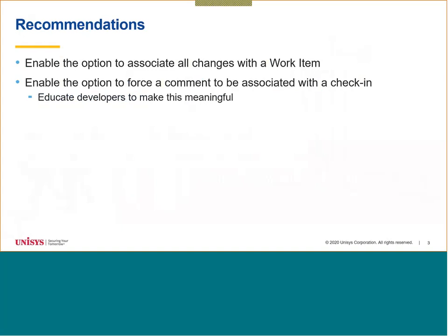A couple of options I would personally recommend when you enable all this: there's an option in Azure DevOps to say every time you make a check-in, it must be associated with a work item. I would strongly recommend you turn that on, such that any change you make, for whatever reason, has to be associated with a work item.